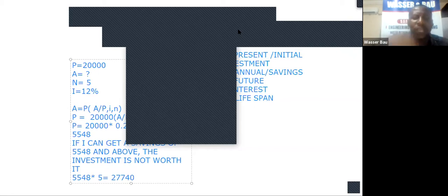The funny thing is that the contractor will now bring a revised estimated cost that will blow your mind. But if they have knowledge of this, they will be able to apply the prevailing borrowing rates. The contractor should prove how much the bank is borrowing him the money. Then we use that borrowing rate and extrapolate the worth of that contract, or the amount of work that is remaining. That will help us to capture by what margin we should increase that contract. That is the end goal of this training.